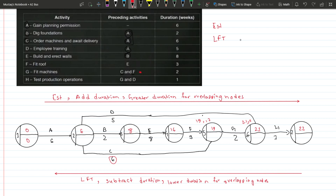Going right to left: the final node is twenty-two. Subtracting gives twenty-one. The next node is twenty-one minus two, which is nineteen, with no overlap. Then we get sixteen, then eight. At A's end node we have three overlaps: B, C, and D. Subtracting two from eight gives six; subtracting six from nineteen gives thirteen; subtracting five from nineteen gives fourteen. The lower number is six, so the LFT at A's end node is six.